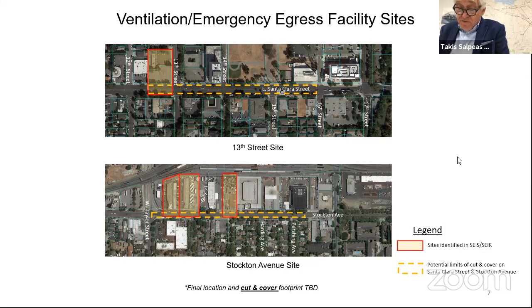And based on the information I collect from there, for 1,200 feet on a major street construction, doing segmental construction, that means you don't shut the cross streets down all at once, but you go piece by piece. And 9 months duration, it's reasonable. That is how I understood it.